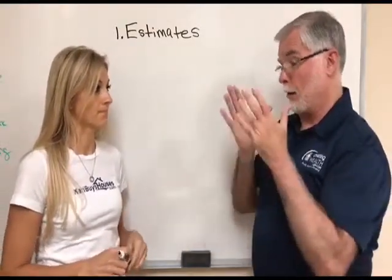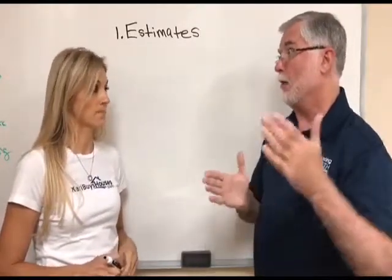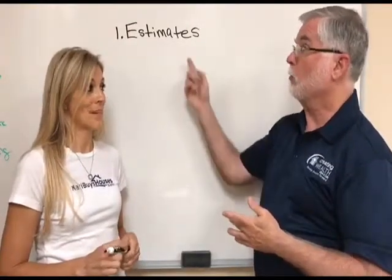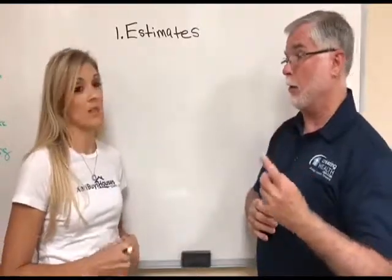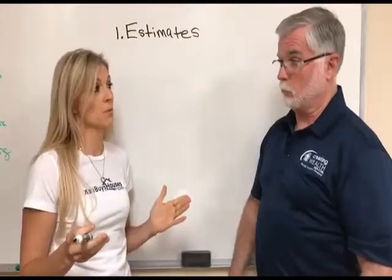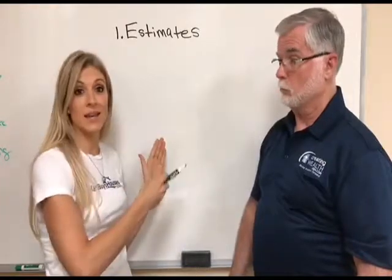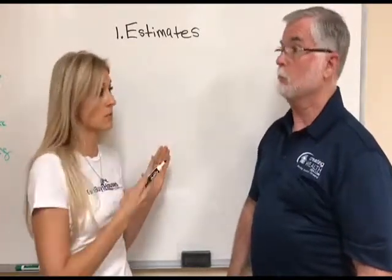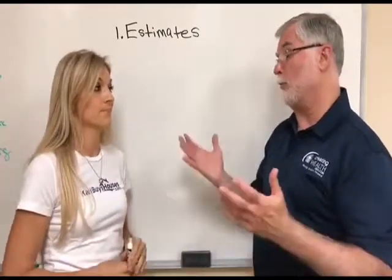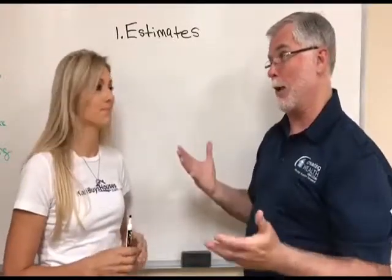So if I can schedule my time effectively and that of my contractors, now I can not only have my estimates, I can have a schedule squared away. So I want to start with my estimates. That's number 1. And what we've been doing, which has been very helpful, is actually printing out a copy of the inspection report and leaving it at our renovation. So whenever a contractor shows up, we can say, hey, go into the kitchen, the inspection report is there, this is what we need fixed, and he can give us an estimate. We don't always necessarily have to meet them. That's great, especially when you've got more than one estimate coming in. Everybody's got basically the same scope of work starting out.